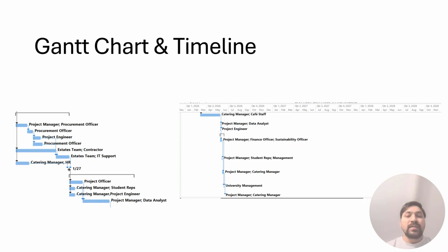And this slide shows the same tasks represented as a Gantt chart. The project runs from early December 2025 to late March 2026. Each blue bar represents the duration of a task, while the arrows between them show the dependencies. At the start of the timeline, you can see the waste and packaging audit and the cost and sales baseline. These are scheduled before the co-design workshop and layout planning, because we need a solid understanding of current impact and financial position before making design decisions.